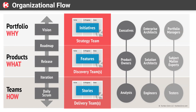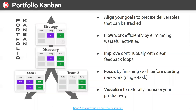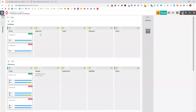This is what portfolio Kanban is — the idea that you manage a portfolio of work on your strategy board, with your highest initiatives or projects, then break them into what we call a discovery board, and the discovery board gets broken into team boards. Initiative purple got broken into one feature, and that feature got broken into three cards — all three went to team one. The green project got broken into two features, and those two features engaged two separate teams. At any given point, you know exactly what is going on in your organization.